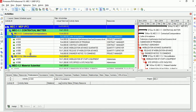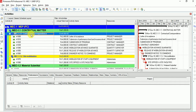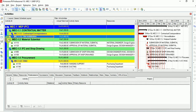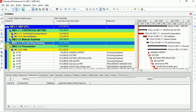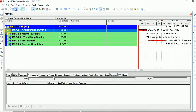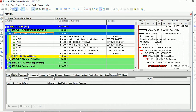These are the activities, and this is the work package. Within a work package, these activities are combined together and they complete that work package. These work packages are then combined together, and once all work packages are complete, they complete your project. So the hierarchy is: activities complete work packages, and work packages complete the project.